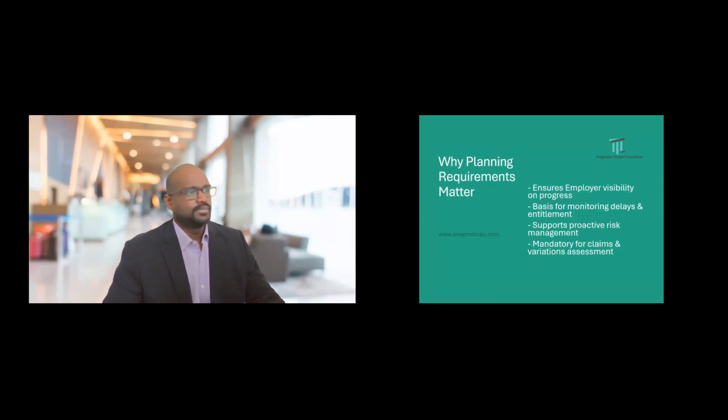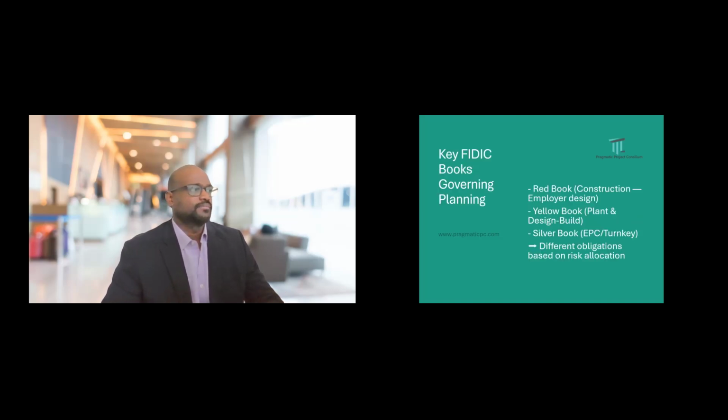So why do planning requirements matter? It ensures employer visibility on the progress, and it forms the basis for monitoring the delays and entitlements. It will be the benchmark. It supports proactive risk management. It is mandatory for claims and variation assessment, as 60% of construction claims are directly delay claims. So in that case, scheduling plays a major role in claims.